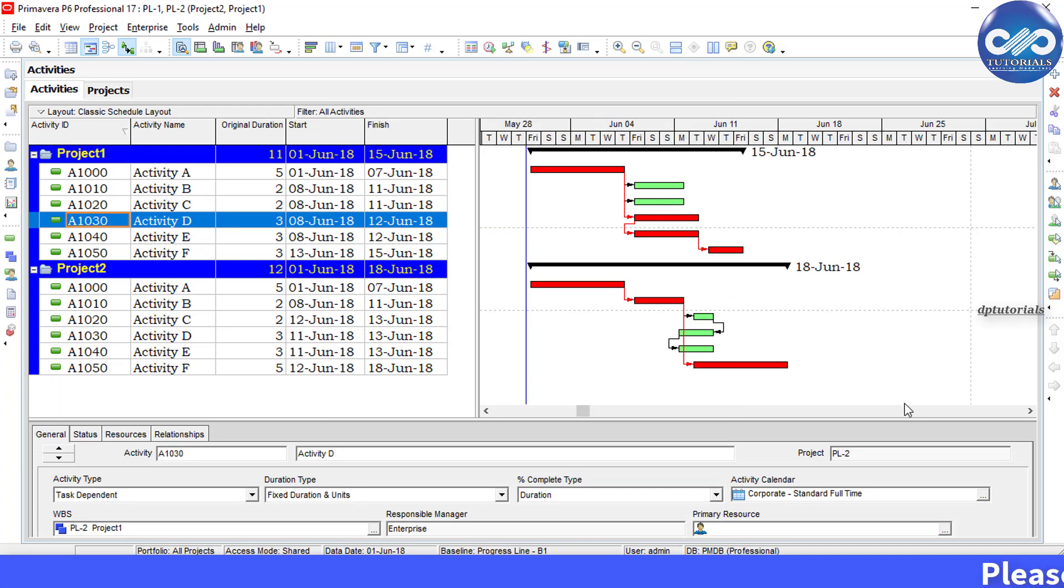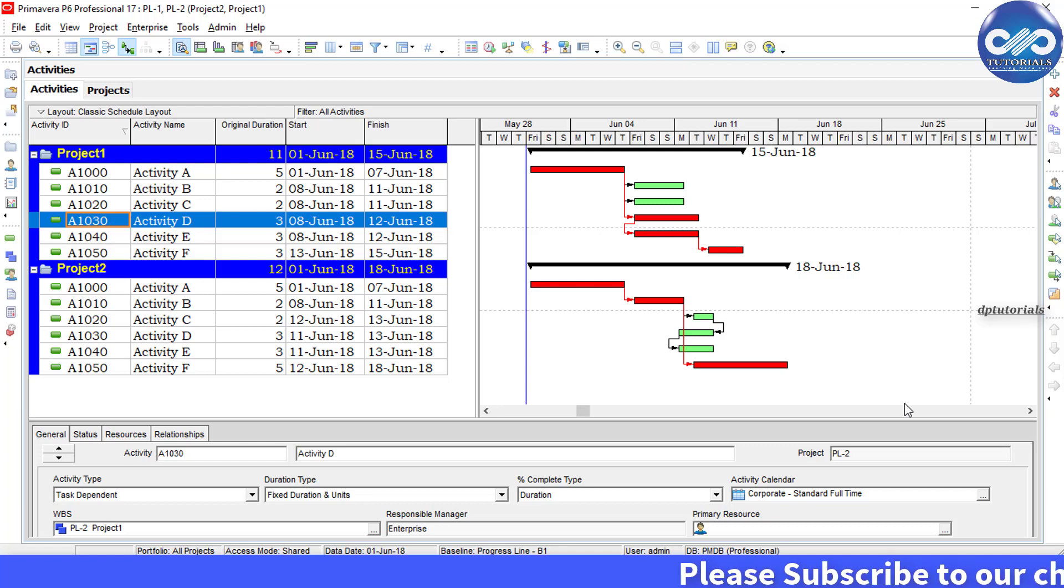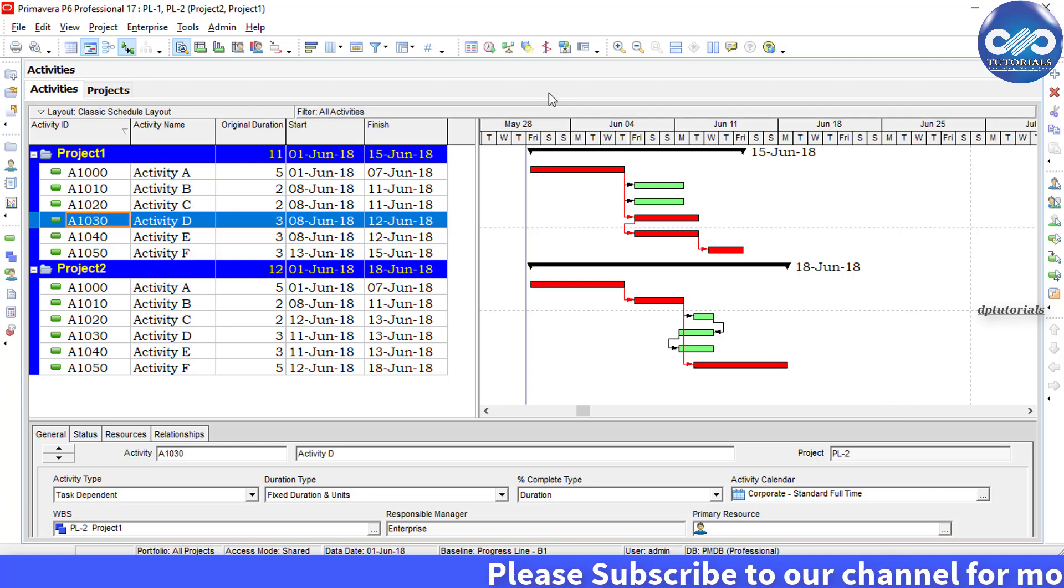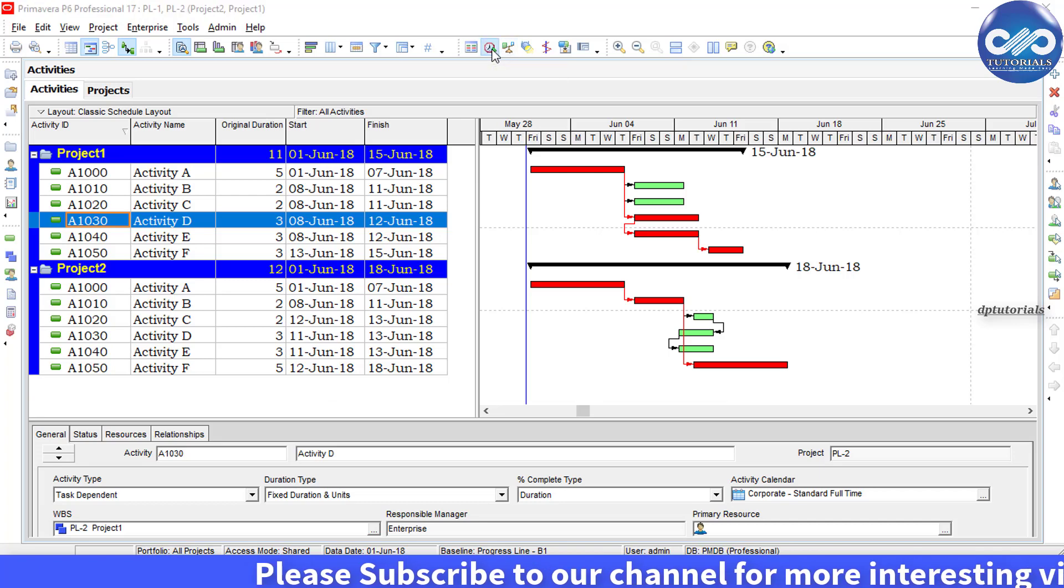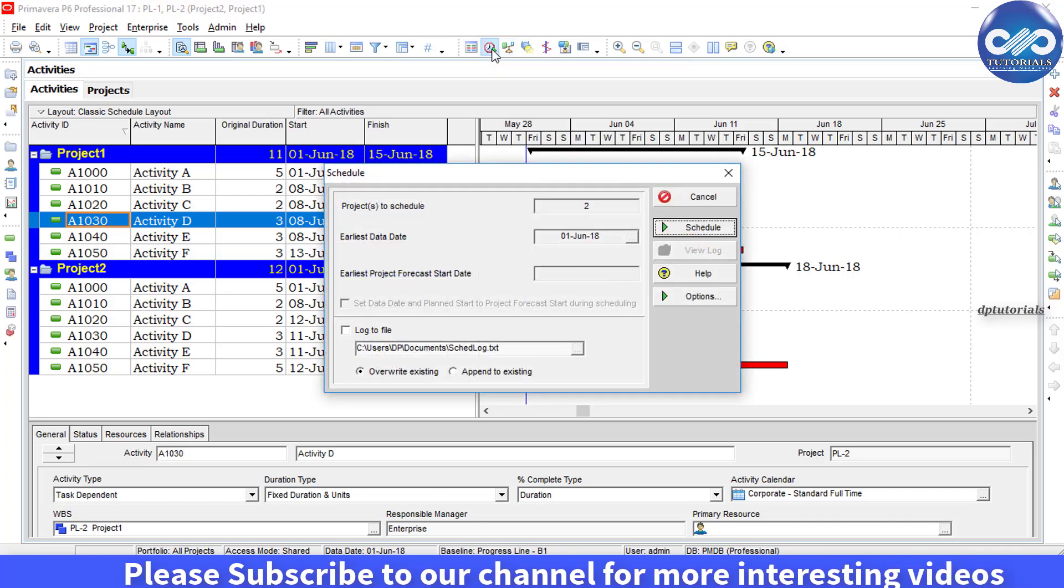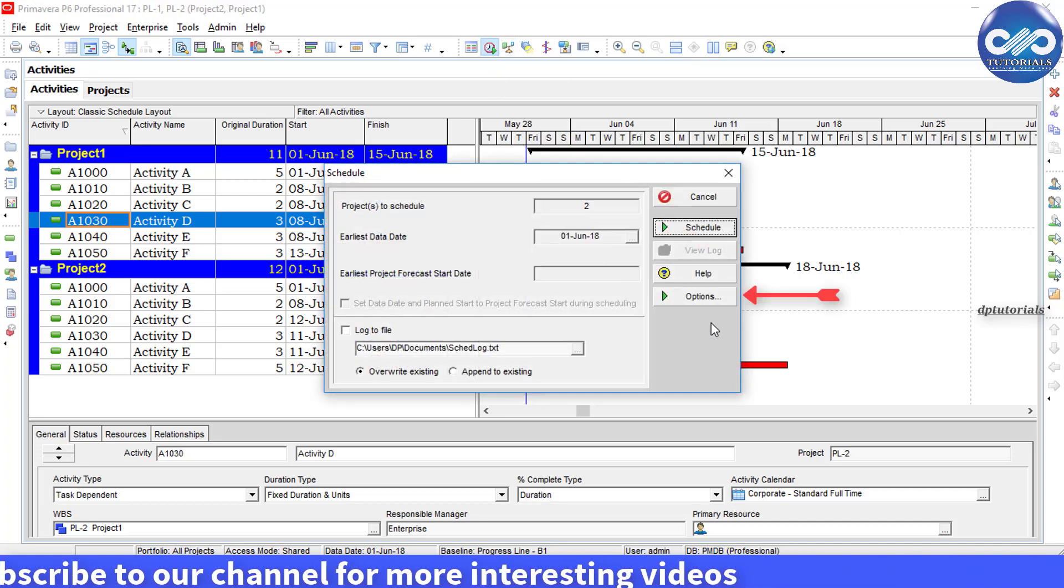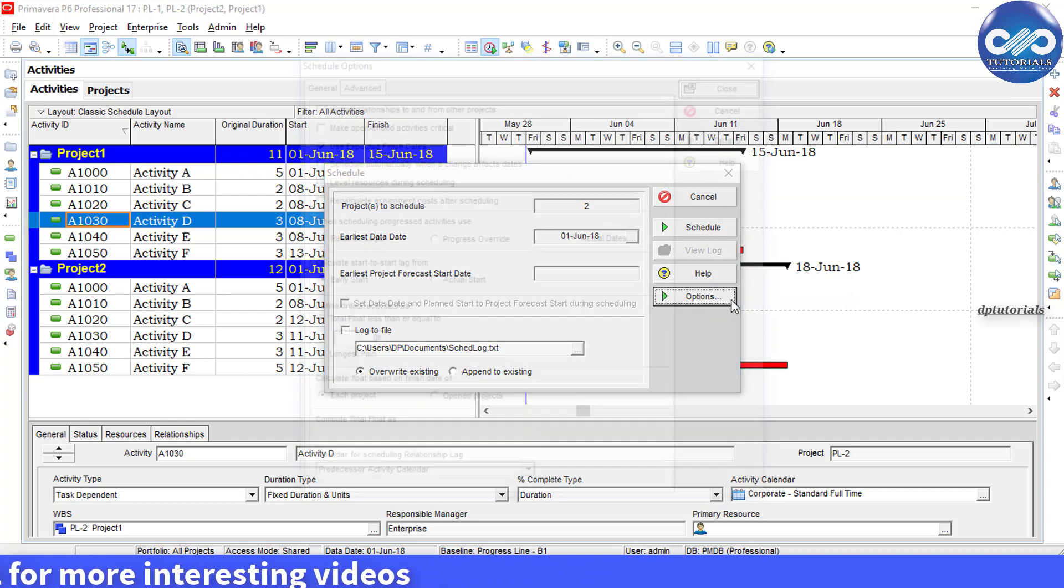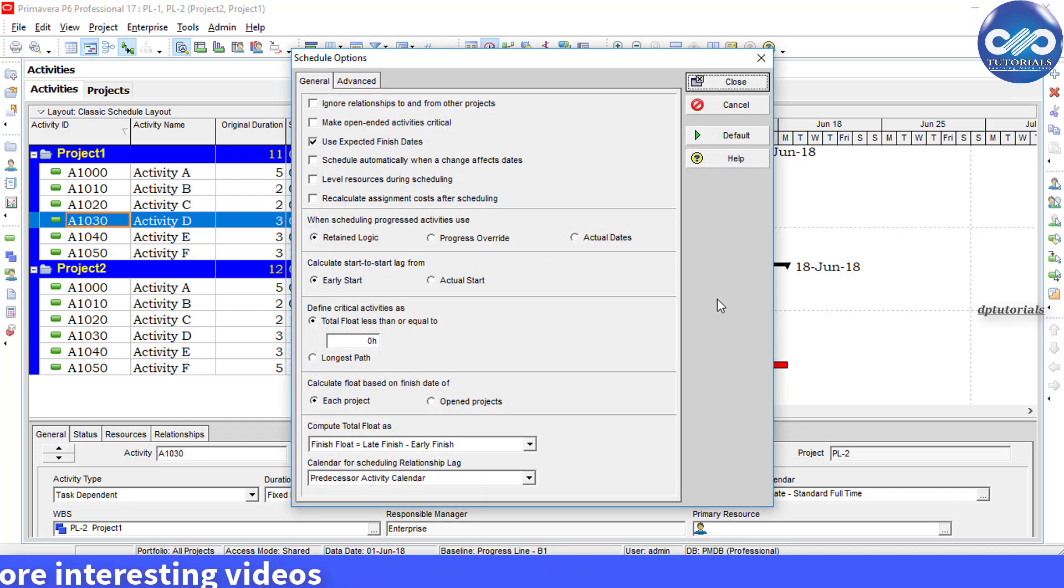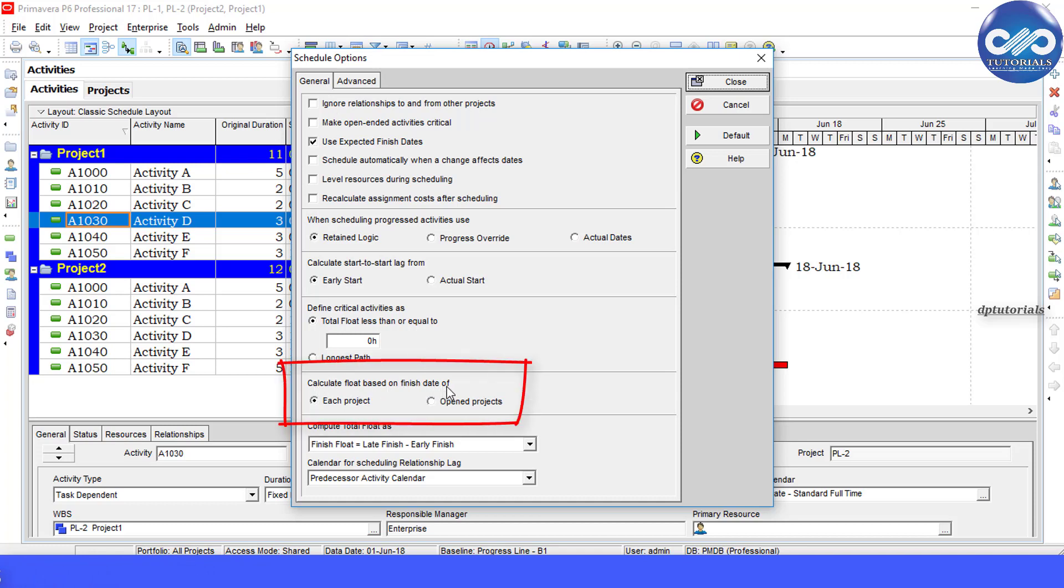projects? Let us see how to do that. Now click on the schedule icon, then click on Options. In the General tab, scroll down, and here under 'Calculate float based on finish date', check this